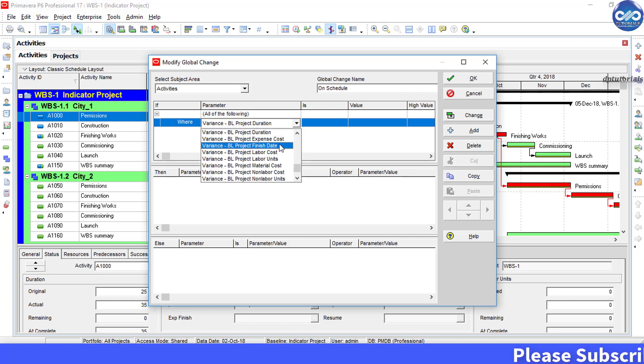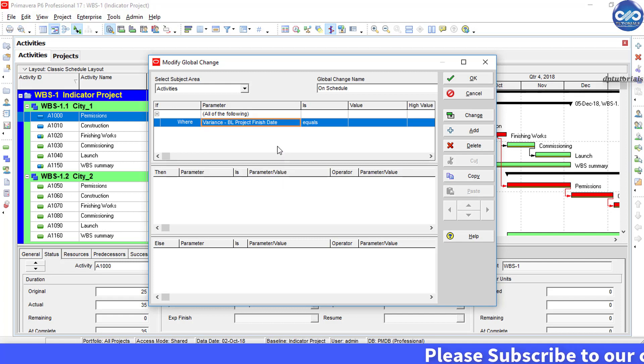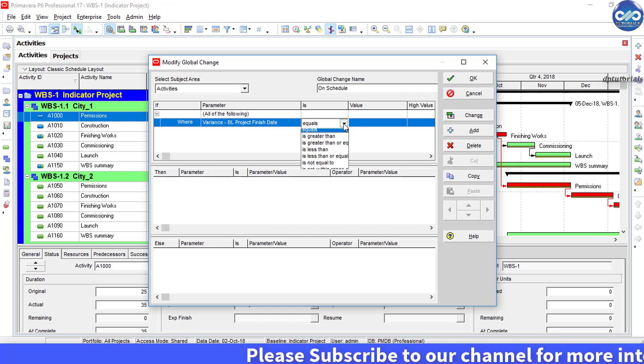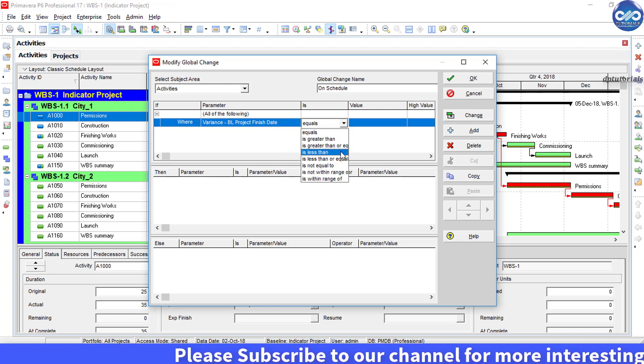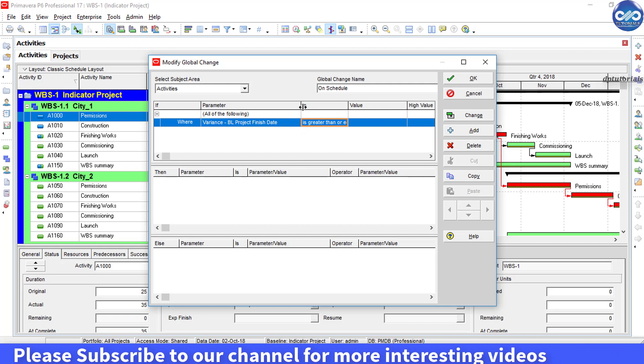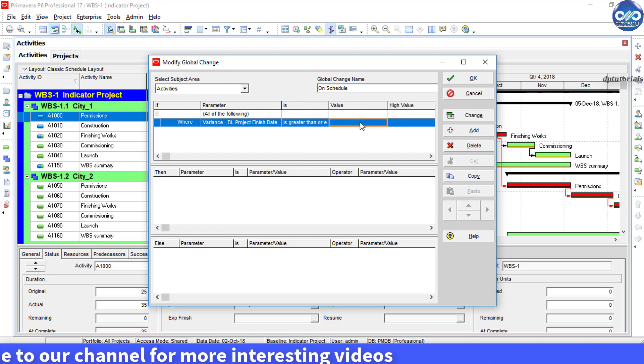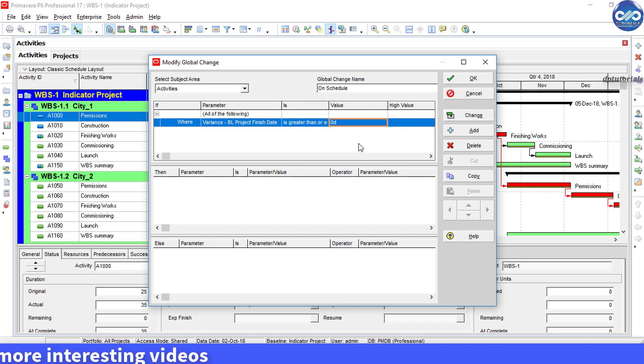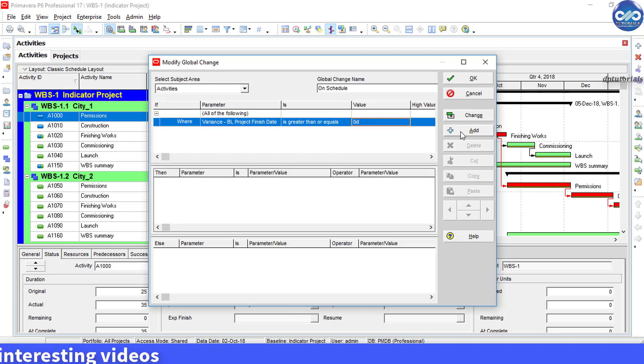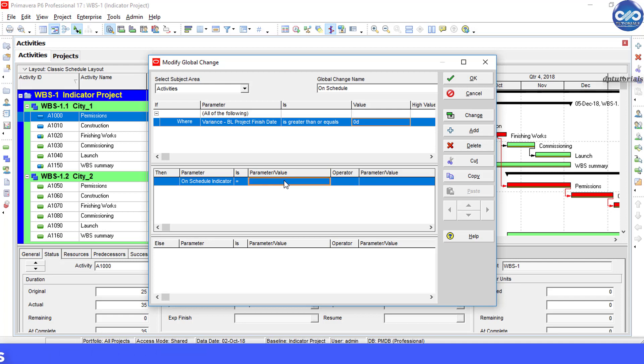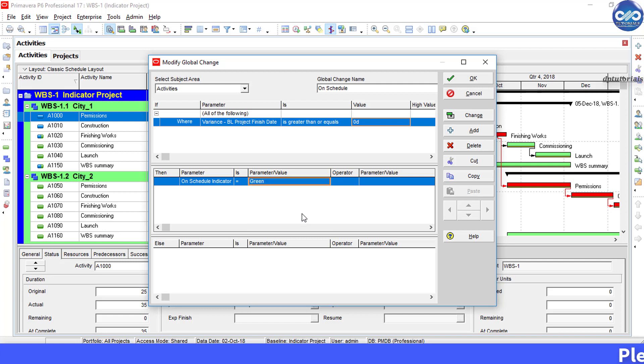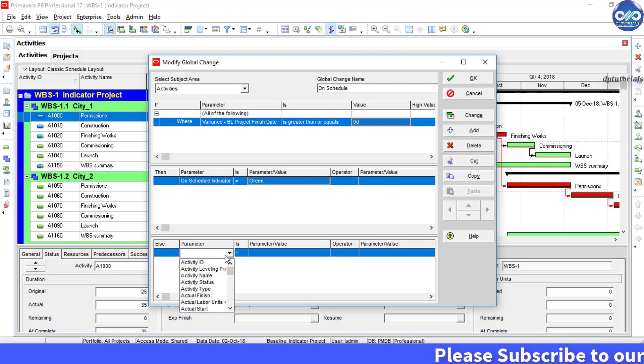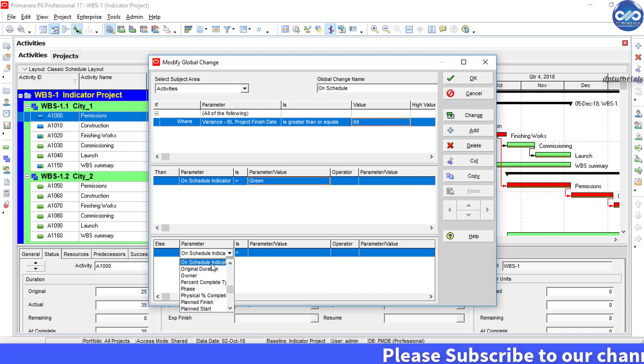Under If, select Where Parameter: Variance Baseline Project Finish Date. Under Is, select Is Greater Than or Equals, and for Value put it as 0 days. In the Then parameter, select On Schedule Indicator is equal to Green. That is, whenever the variance based on project finish date is greater than zero, it will show green.